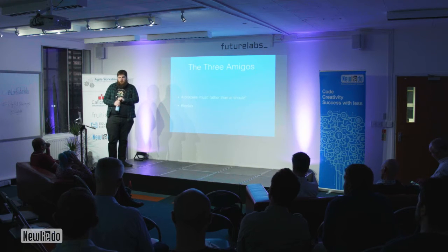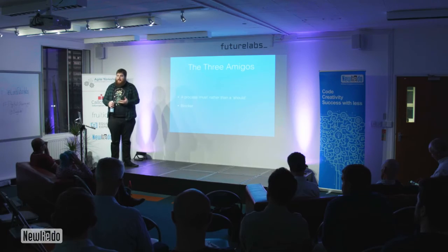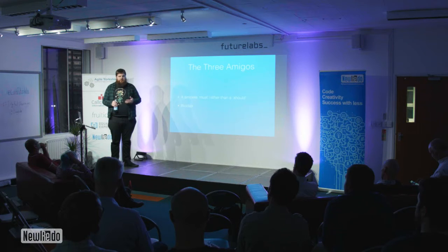The things I would note from my experience with it is that if you go from saying it's a mandatory part of the process to "we should do this most of the time, but sometimes we might not," devs will treat that as an excuse for not doing it, and then it disappears, and it's like going back to before when you didn't have it, and you see a lot of the problems coming back. On the other side of that, though, by making it a must-have, it becomes a bit of a blocker, and that requires some careful management around BAs' time and making sure that they're available to actually carry out that session.